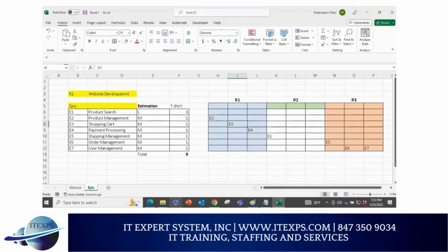You guys agree or not? We don't know how shopping cart will work. We don't know how product. We just think what business wants, and it's doable with this three-member team. And we are using a common language that if 3 members work collectively, then small means half, 15 days, medium means 1 month, and that's the common language we use. So here, the most important is called ballpark. In America we call it ballpark, but in the industry there is a concept called ROM. What do you call ROM? ROM stands for rough order of magnitude.